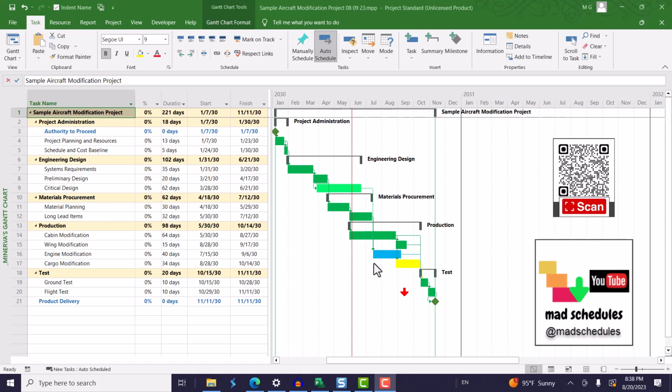And then you can do the 5% thing once your customer and you and your company have agreed to that. And then we go on to high float. High float means that you have too many days or too much time between one task and another because probably something happened with your links that you put in there. So when you do that, it gives a false sense of safety or that you are actually going to deliver the product on time. So you look for that. And there is a percentage of it, usually 5% of your tasks can have high float.